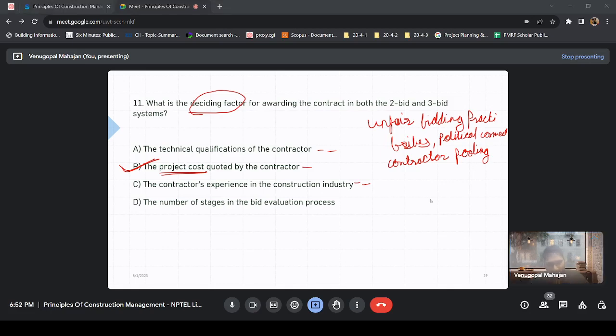The tender inviting authority also has specific conditions in the contract, like unconditional acceptance. So they bind the contractor to complete the project in any case. That's why they take bank guarantees and security deposits, right? Yes.